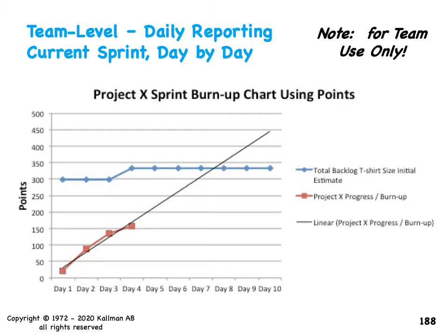And we would plot day by day how the team's doing, and we could watch to see if their backlog grew a little bit during the sprint as they got better at estimating the size of the work they were doing. It might have taken them a few days to realize that this item that was 8 points was actually 35 points or 30 points or whatever. Well, using the Fibonacci, it would have been a different size, but it doesn't matter. Whatever it is, they realized that a couple of the items were bigger than they thought.